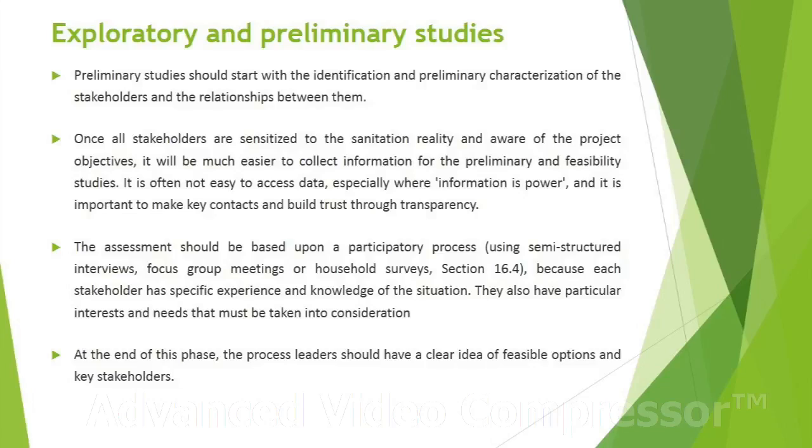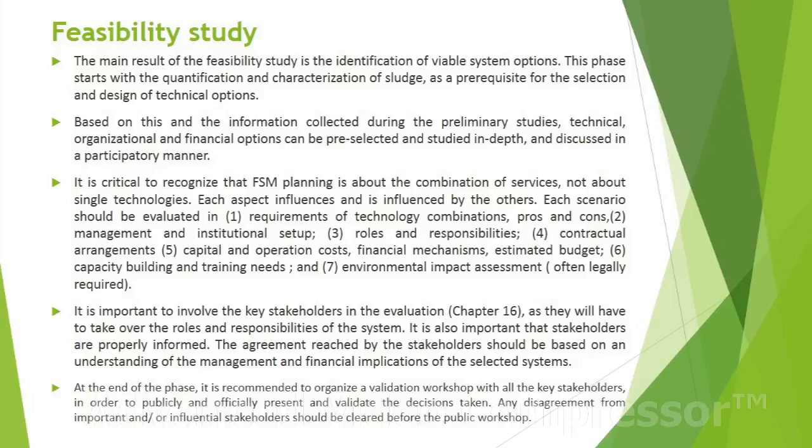The assessment should be based upon a participatory process using semi-structured interviews, focus group meetings, or household surveys. Because each stakeholder has a specific experience and knowledge of the situation, they also have particular interests and needs that must be taken into consideration. At the end of this phase, the process leaders should have a clear idea of feasible options and key stakeholders.